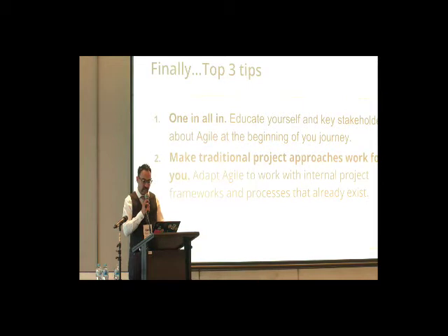I suggest keeping a product backlog of user stories as you go along, even if you're not actively running in sprints. Then you can potentially use a Kanban-style approach, where your team can just pick one or two of the top fully groomed user stories which are ready to be developed when you have a sprint ready, even if that's just one developer working one day a week.